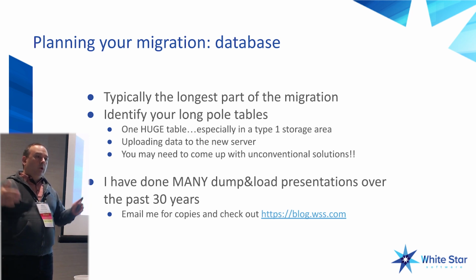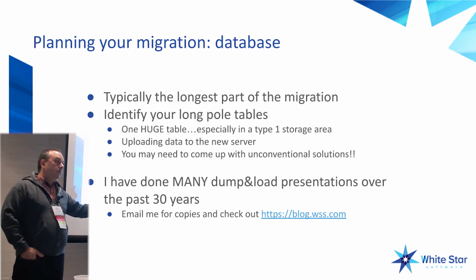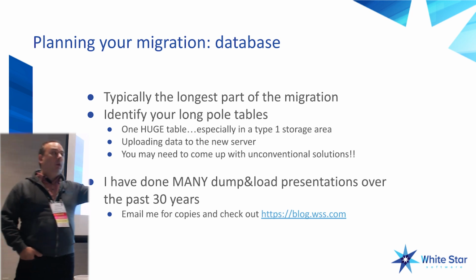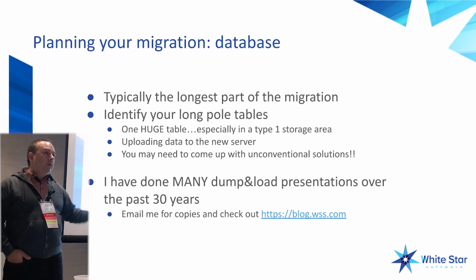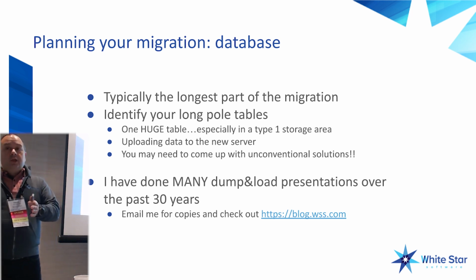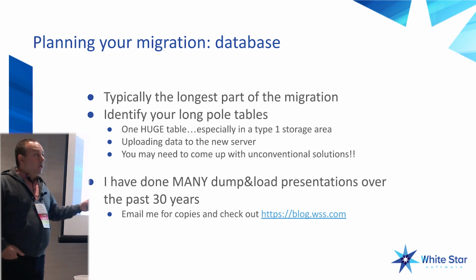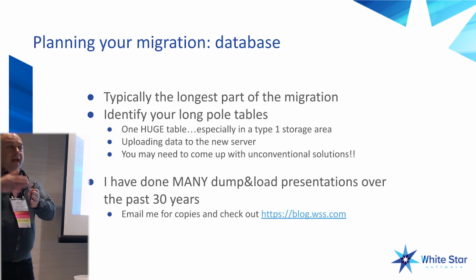You can do multiple simultaneous dumps. We can use your dev, test, and QA server. So we can copy the database to all of the servers and dump partially from all the different servers. There's a whole bunch of different ways. If it's historical data, we can dump a lot of it ahead of time because it's not going to change anyways. So maybe you can dump 90% of the data in the week leading up to the migration. And then at go live, you just dump the last 10%.